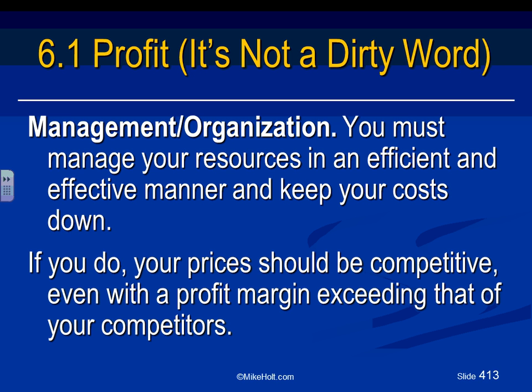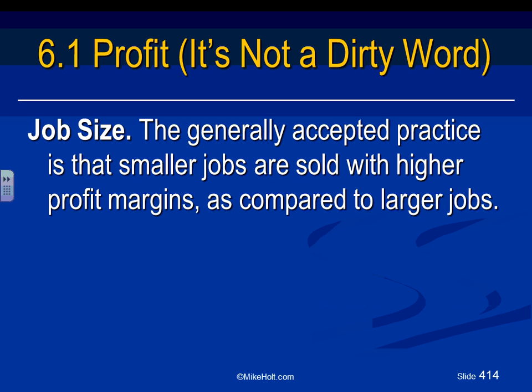So your price should be competitive. So you have to have a competitive price, guys, with a reasonable margin of profit. Job size. Here's what they say. Accepted prices is that smaller jobs are sold with a higher profit margin as compared to larger jobs.